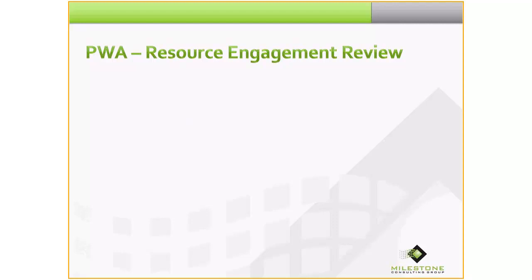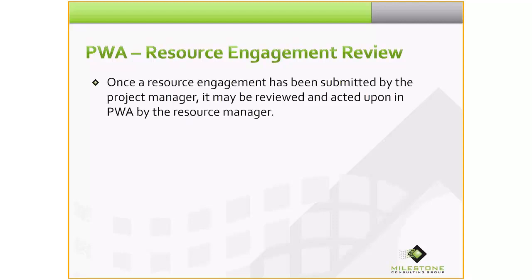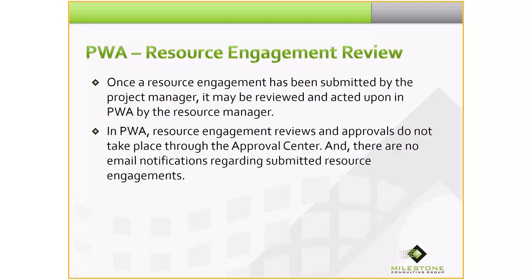So now that I've done my job as the project manager, I'll put my resource manager hat on. Once a resource engagement has been submitted by the project manager, it may be reviewed and acted upon in PWA by the resource manager. In PWA, resource engagement reviews and approvals do not take place through the Approval Center, and there are no email notifications regarding submitted resource engagements.